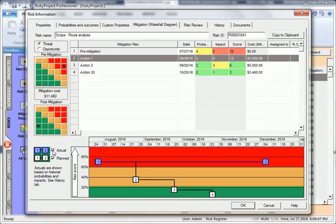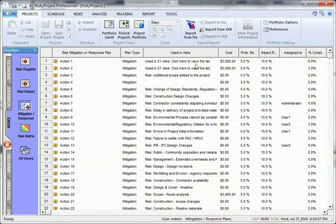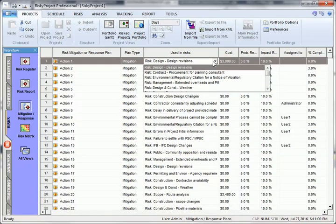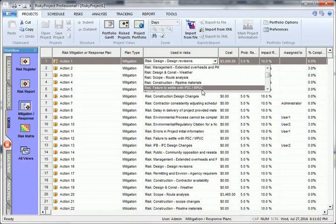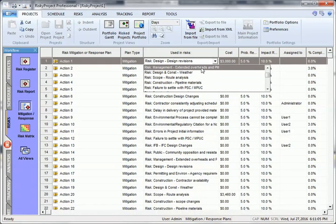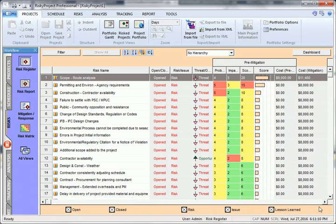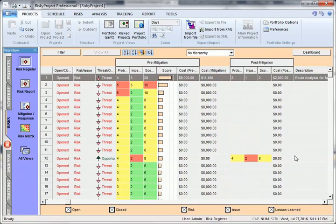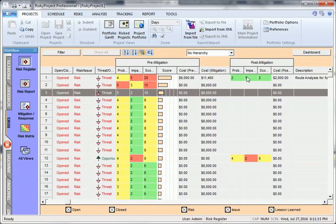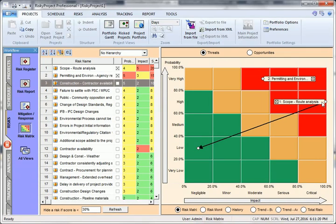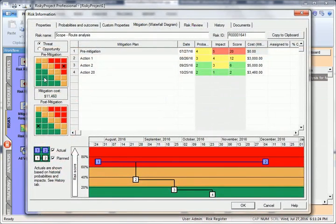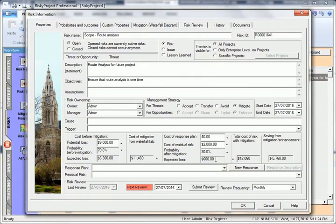Open the mitigation response view and you will see that the plans have been assigned to the risk. Plans can be assigned to one or more risks. The mitigation plan's risk plans are reflected in the post-mitigation probabilities, impacts, and scores, as well as the risk matrix where an arrow depicts changes to risk score due to risk plans. Response plans can also be assigned to risks. They are used to model the cost of response to risks if they occur.